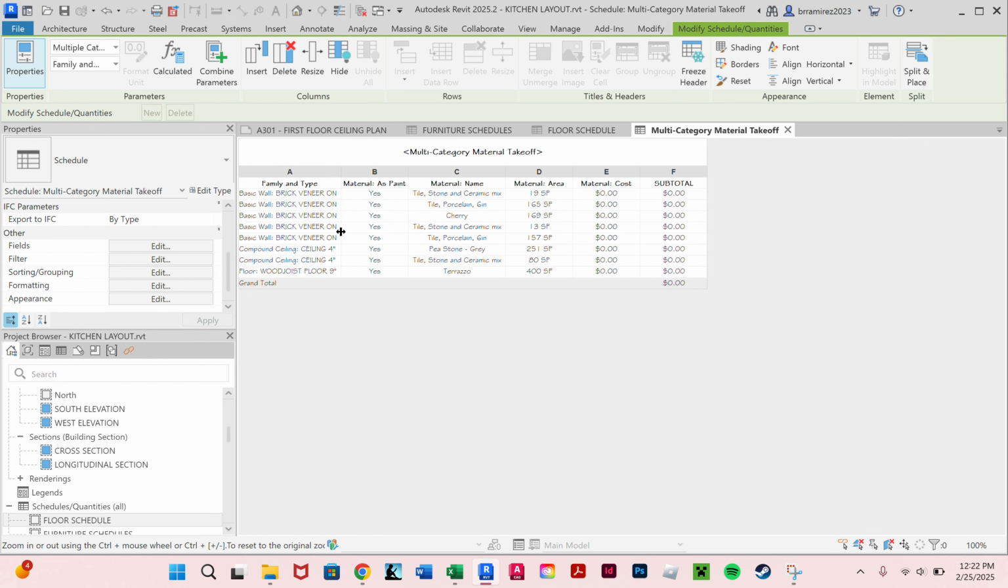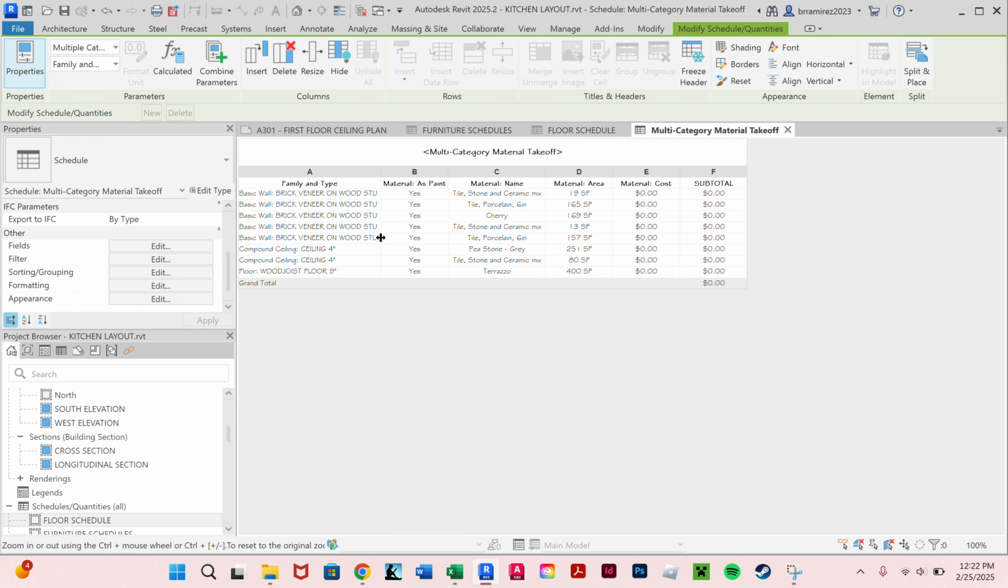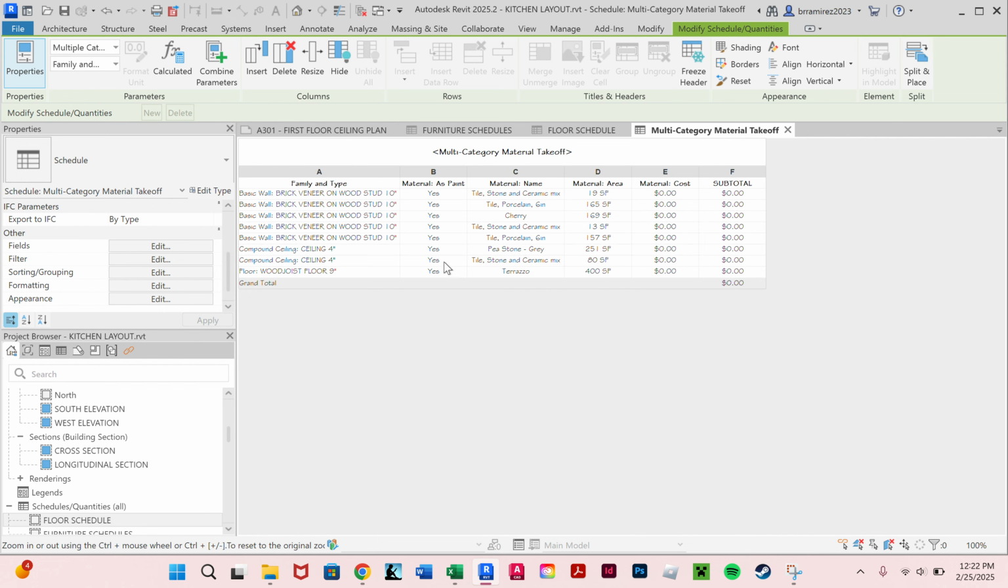So now I need to really apply unit cost for this material. Let's look at cost estimation data. You can see finish. There's a hardwood flooring, that's $9.50. Tile flooring, $8.50. Carpet there, wall paint there, and wall tile there. I have a tile that's $10. I want to put tile at $10. And then paint. What is the paint? Paint is $2.50. So I want to put the 2.5 for there. You have more. Okay, that is my schedule.